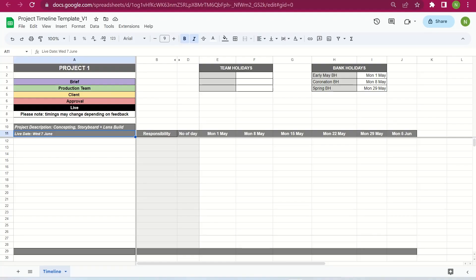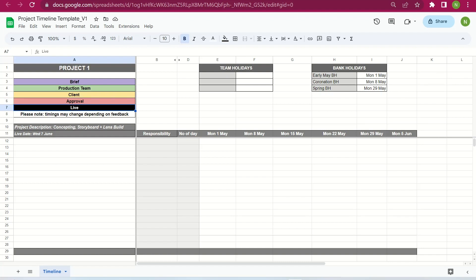So we're back to start the demonstration. As you can see here, we've got our project timeline. We'll start with an overall explanation of each part before we get right in. This is where you put the project title — for this demonstration I've just put 'Project One.' Here we have specific color codes: purple means we are waiting to receive the brief; green means it's with us, the internal teams; yellow means it's with the client; red means the project has been approved; and black means the project is live.